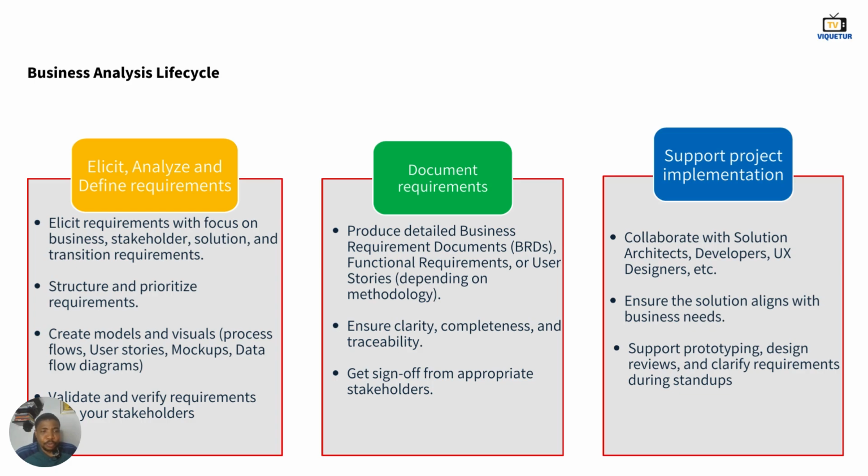So you assign story points, you align with your devs, you get all of these things done. You set up stand-up meetings. Stand-up meetings are meetings that you do every morning, 15 minutes, where your developers tell you what was done yesterday, what their blockers are, and what they are going to do today. You collaborate with them